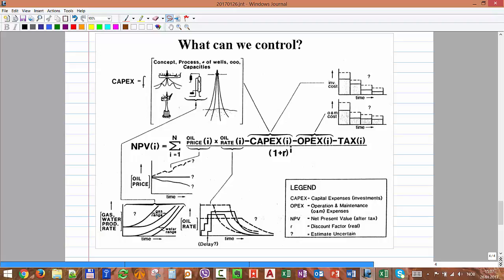This capex in this case has the drillex inside. Okay. And the opex depends on the size, how much fluids I'm going to produce. So everything is interconnected. The opex depends on how much fluids I'm going to produce, how much I have to process, how much chemicals I need, how many people I need to operate my facility. Okay, so everything is in a way interconnected.